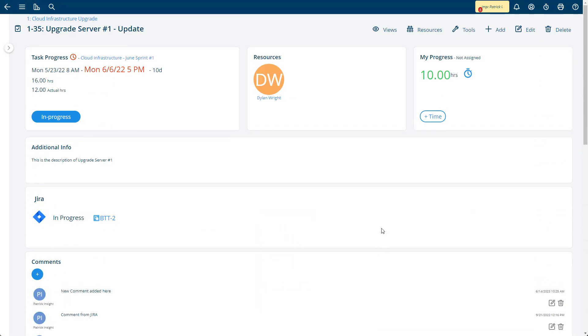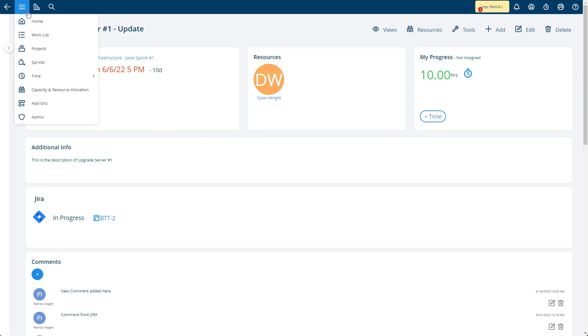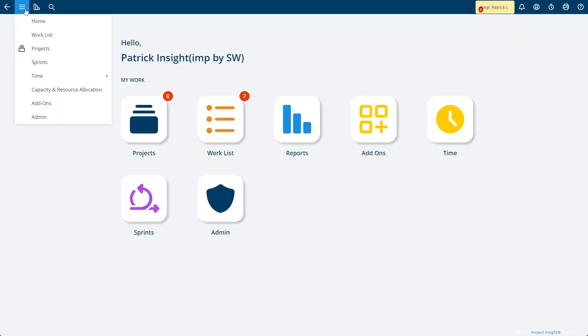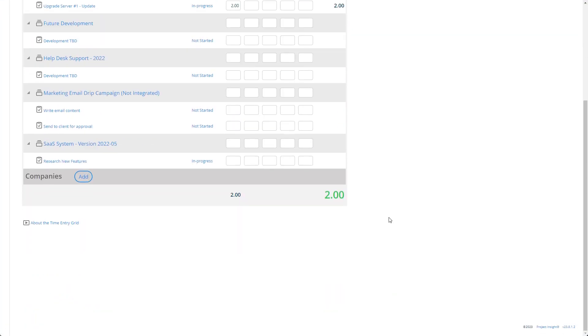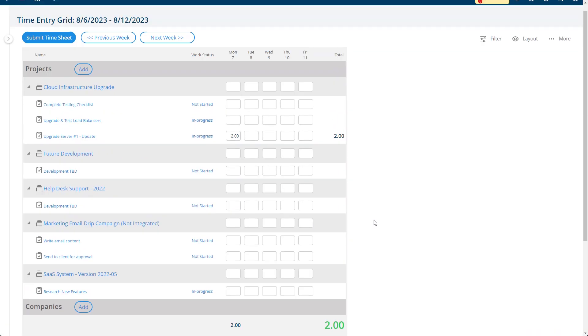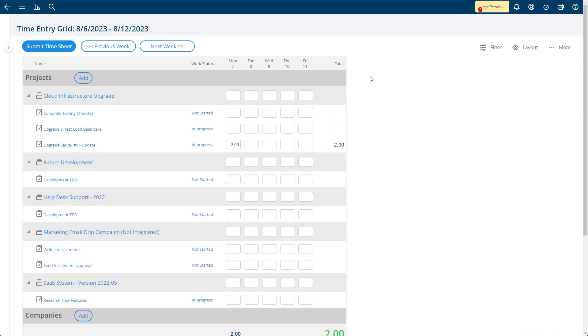So that gets rolled up into all of the time and will appear on the grid. There's the two hours I just entered there. Now there's two hours so far for this week today. And this combines with any other time tracking that might be going on, whether it's in Jira or outside of Jira.